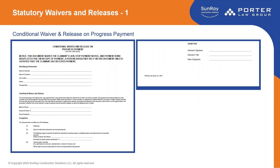Here is the 'Conditional Waiver and Release on Progress Payment' form. The form will include: the name of the claimant — that's you — the name of the customer, the job location described by address, and who the owner is. Then the through date, which is important because it means you are giving up all your claims for all work and materials supplied through that date. The language waives all claims conditionally for everything you've delivered and all work done to that date.